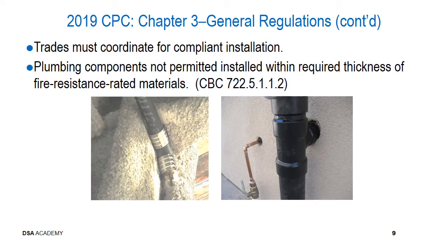As we all know, in real construction, generally there is a race between trades. Whoever gets to an area first and begins working in that area usually has a lot of flexibility with respect to available space and what they can and can't do, particularly if it concerns routing of, say, electrical, plumbing, mechanical.